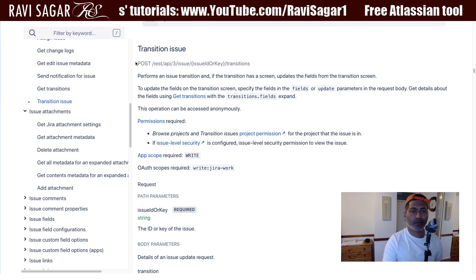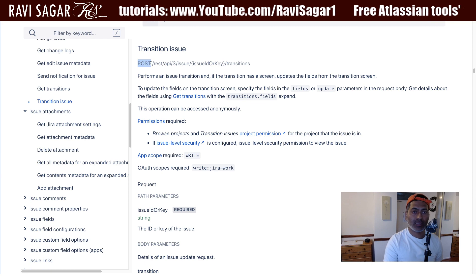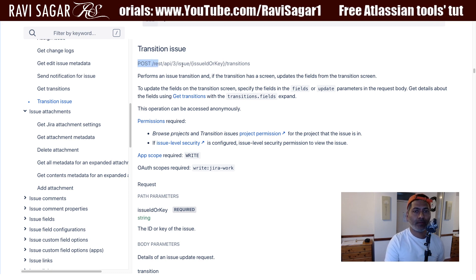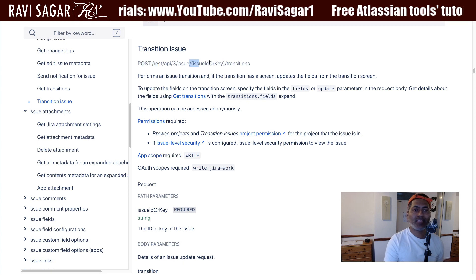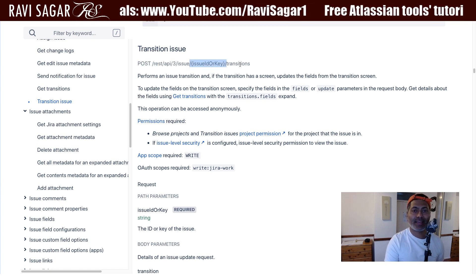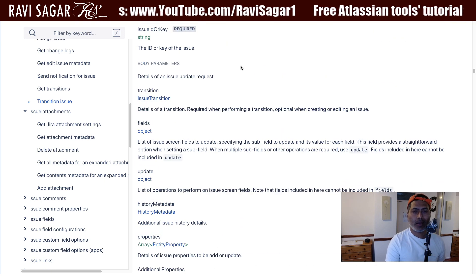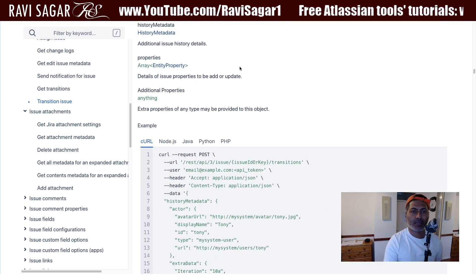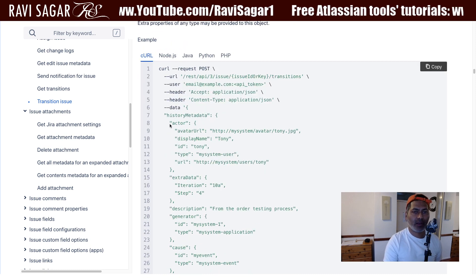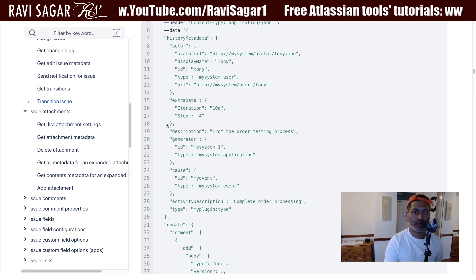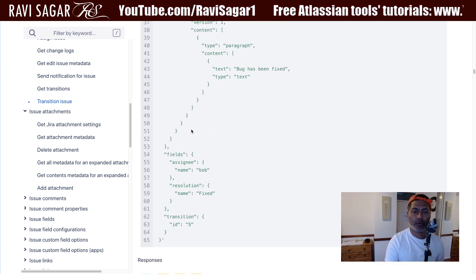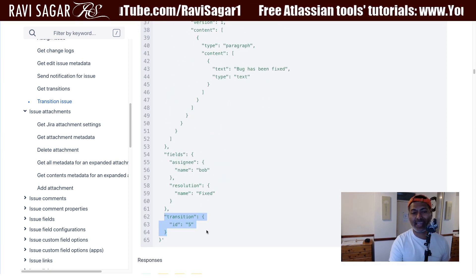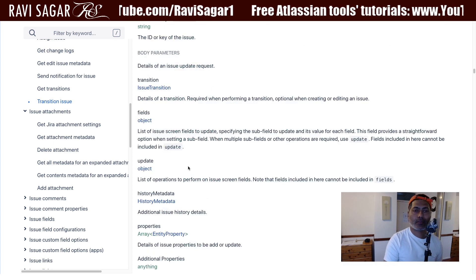If you look at this endpoint, it is using the POST method and the endpoint is REST API 3, followed by the issue key or issue ID, and then 'transition'. You need to provide a JSON body that has some information — at least the transition that you're trying to do. The bare minimum here is the transition ID.